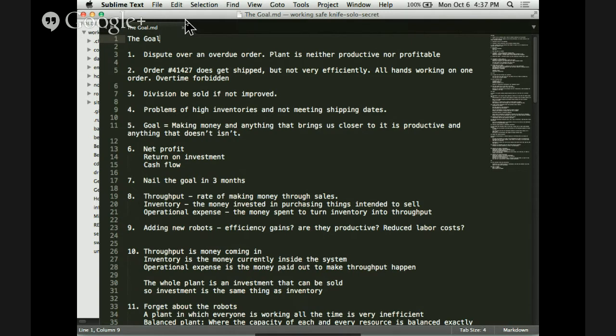You want to further optimize this game by looking at this group and examining their backpack. What are they carrying? And emptying the backpack and giving it to these guys. This is, I know, poor guys. You need to actually do this thing actively, and you can do the same thing actively in your workplace. You know how you will do this? This is called work rebalancing. If you have too many work items on one guy, the fat guy who's the slow guy, you want to rebalance that, right? You typically do that.